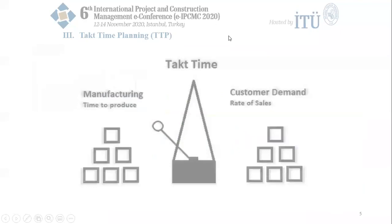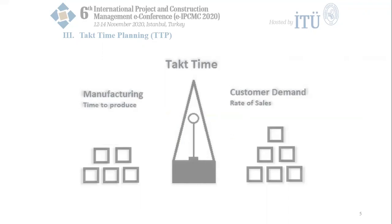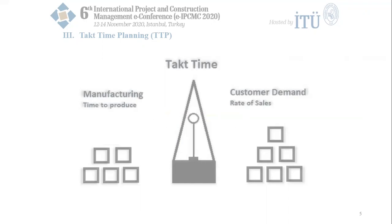Lean philosophy aims to eliminate the seven types of waste: overproduction, inventory, repair/rejects, motion, transport, processing, and waiting. In the construction industry, lean also embraces the principles of value, value stream, flow, pull, and perfection. Takt time planning is increasingly used for residential construction projects, highway projects, and hospital projects in different countries.